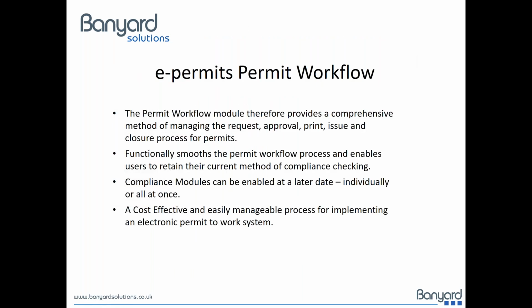So the ePermit workflow module, that's just a very brief overview of that. It gives you a comprehensive method of managing the request, approval, print, issue and closure process for permits. It's all electronic, it's all automated, things are routed around the organization, and nothing can move ahead until steps are done. So you cannot have a contractor turn up if the permits have not yet been approved. If they do turn up, you can send them home.